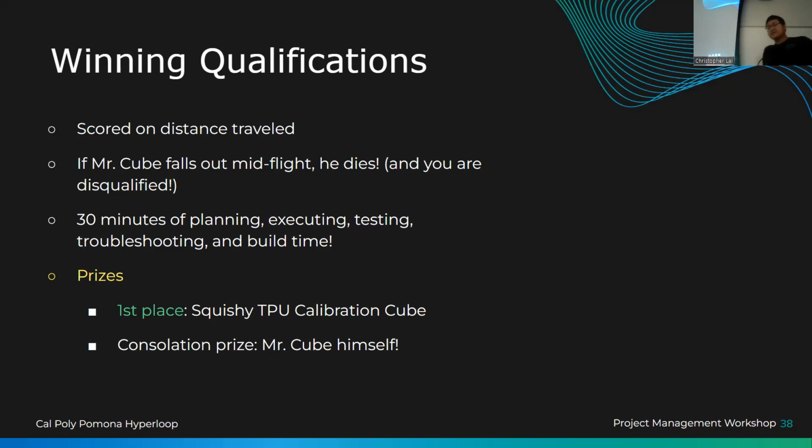For the most part, a lot of these situations don't actually happen in the real world if you start off with a contract with the customer that says after X amount of time you can't make changes anymore, right? But a lot of times that doesn't happen because the customer will not sign it. But in this presentation we're talking about hobbyist robotics, but that is very true if you ever work in the industry and have to design for a customer. They're kind of annoying like that.